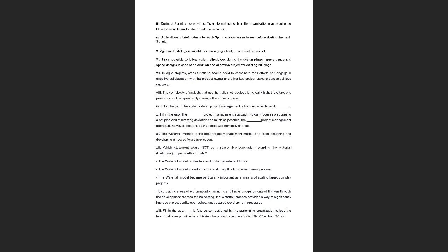But the design phase can be done using the agile methodology, because here we can break down different floor designs into different sprints, and then we can have constant communication with the project sponsors, and then we can improvise on the design. So this is a false statement.